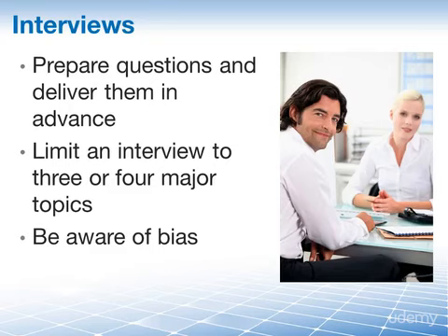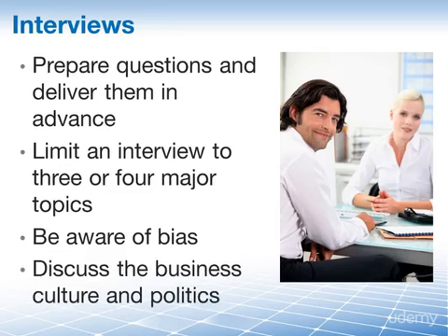And most importantly, don't forget to also discuss the business culture and political challenges of this project, of the product, of the general environment that you're working in as you are meeting this particular stakeholder one-on-one. Remember, this is the moment when you can get confidential information from them because you're one-on-one.